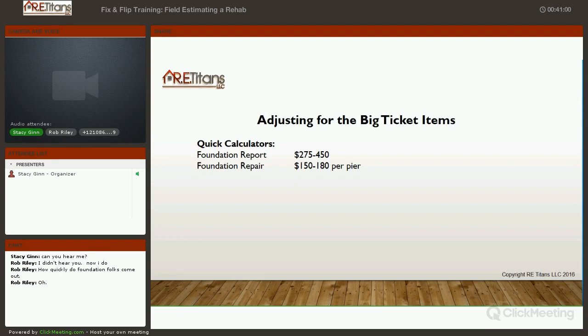It's just inevitable. I haven't seen a house yet. Kelly, I don't know if you have, but I've dealt with a lot of foundation repair when we did work in Bel Air, and then on houses that I've done myself, and then we've done as a company. And when you adjust the foundation, you are going to have sheetrock damage, door adjustments and stuff like that. So you are looking at your higher end when you talk about that side of your estimate.